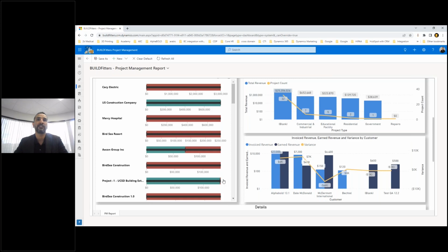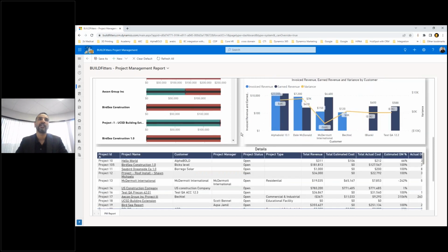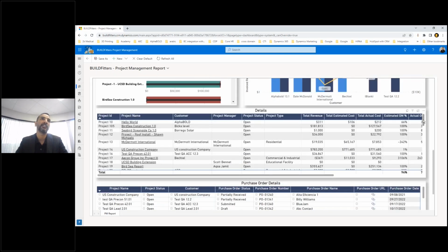This is the project that we were looking at. So you can see that this is now starting to go a little over budget. My actual cost is going over the estimated cost. So I probably need to do more change requests in here. I have all of this information available to me at my fingertips because I have one connected system.